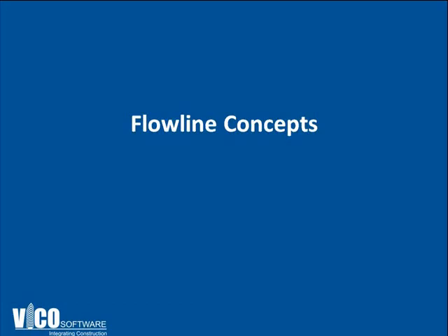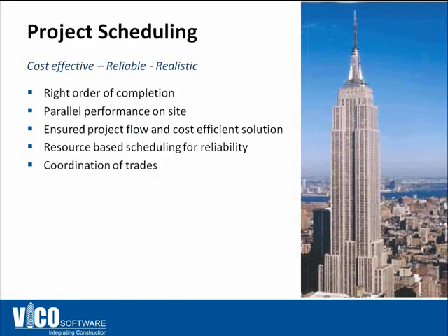So Flowline is actually not something that is new. It was used on building the Empire State Building. The Empire State Building was built in just a little over 1 year. The builders had to manage thousands of people on a very tight site. They basically drew Flowline on paper with pencil. It helped them ensure continuous flow and efficiently utilize the tight site and locations during construction.